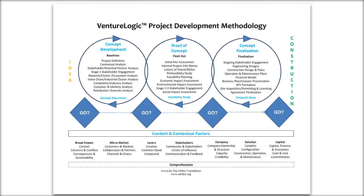Now let's look at the content and contextual factors. We have basically seven categories and in total 21 dimensions that you look at when talking about the content and context of your project. First we have 'broad impact' — these are issues and variables that permeate the entire project life cycle and are embedded into many different areas of the project. The first dimension is 'context,' which refers to the environment in which the project is being developed and will operate, covering a multitude of factors that may directly or indirectly impact the project.